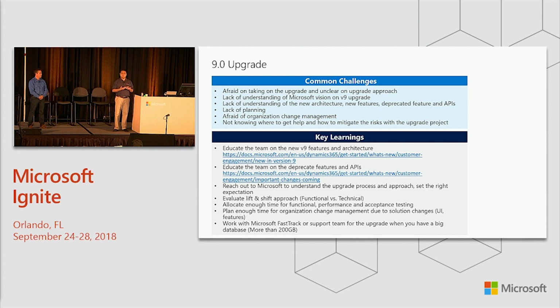And then you can do analysis and see what is actually broken under the web client, not the unified client. And then after you upgrade the platform to 9.0, you have more time to work with the business, work with the change management team to do all the training that you need to convert to the unified client.